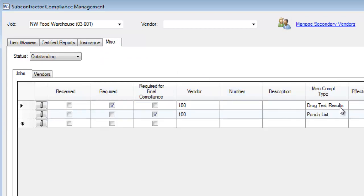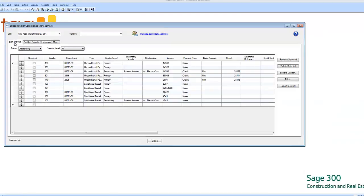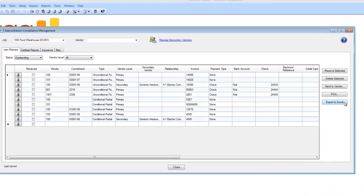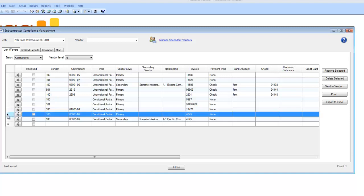So, in this job, I need drug test results and punch lists from all of my vendors. I can easily export all this information into Excel or I can print it out. If one of my vendors is missing one of my lien releases, I can select the lien release, hit print, and automatically print out a new lien release to send to that vendor.